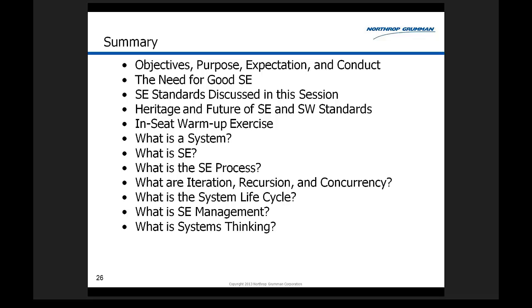Yeah, we use earned value, okay, and earned value is basically earned budget. You set up a budget for things that you intend to do, and as you actually do the work and complete work on those items, you give yourself credit for earning the budget associated with those items.